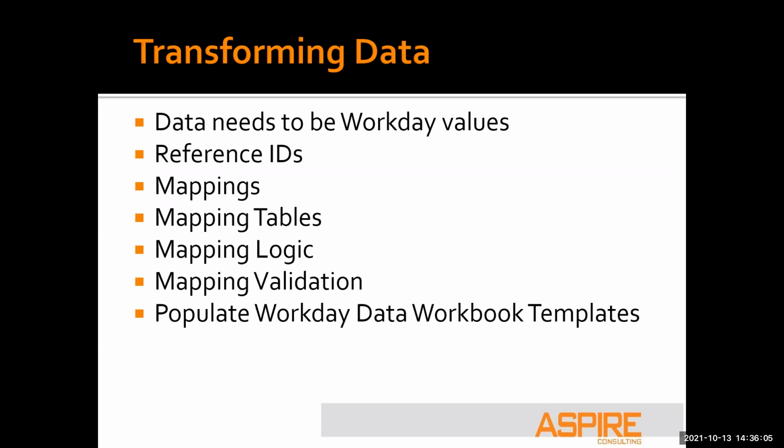More, especially when you get into older data. Let's say you had somebody that termed 15 years ago. Well, you might not have that job code anymore. As an example, that person might have been in job code ABC, but you don't have ABC anymore. And you're certainly not going to configure that job profile in your new Workday environment just to handle that person that termed 15 years ago. So while it can be done, and it is certainly a decision that you can make, there are some additional complications that will come with it.